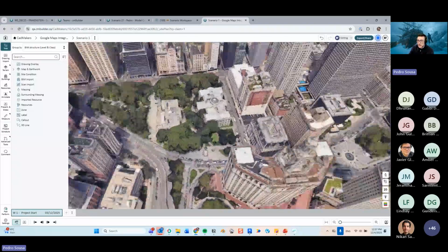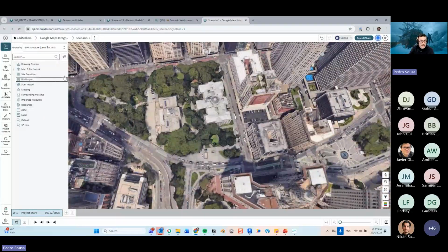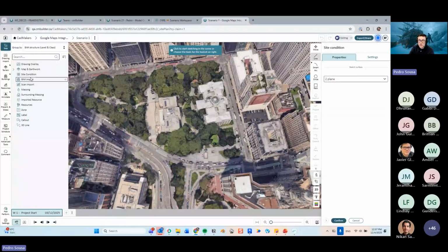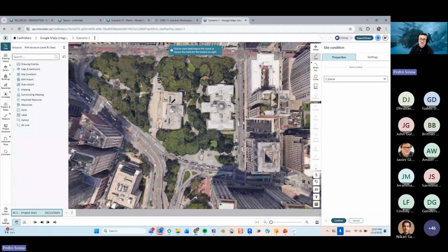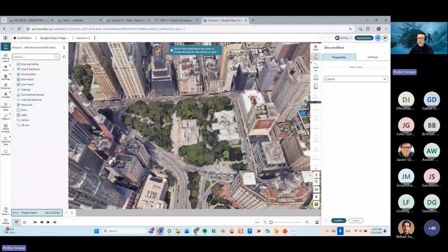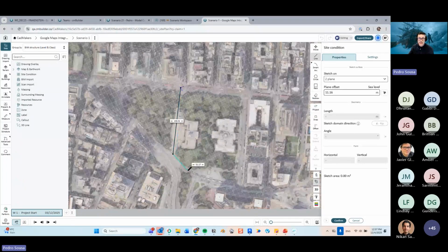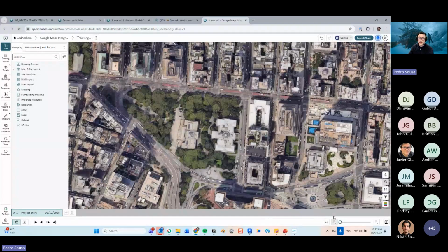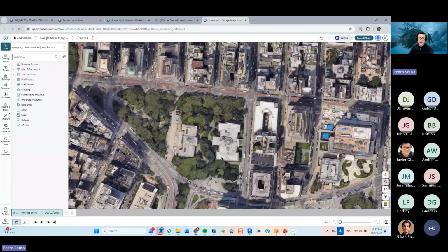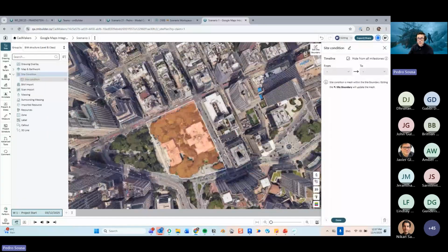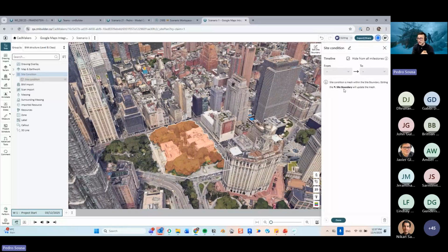and that's what you're going to be using for your site plan, right? The next thing is that you'll be able to create an area that we don't know yet which name we're going to use for this, but let's say your work area is going to be at this location. We will now be able to select this area, and when I hit OK, this whole area is going to be converted into a working area that I can connect to my timeline. I want to get to this point seeing this whole geometry, and then I want that geometry to go away after a certain milestone.